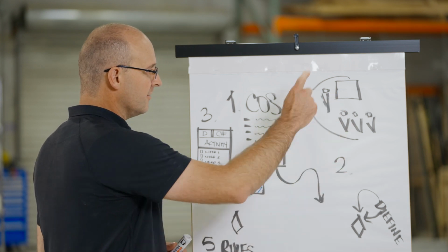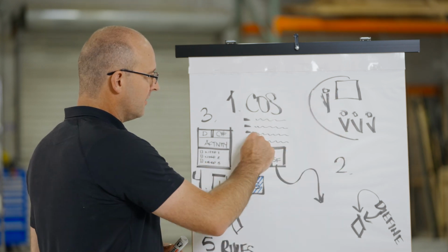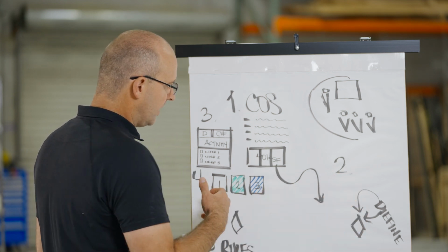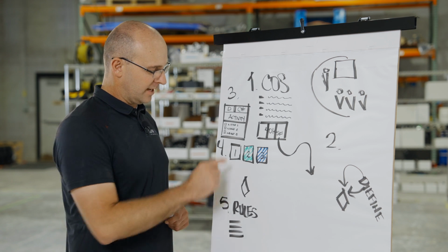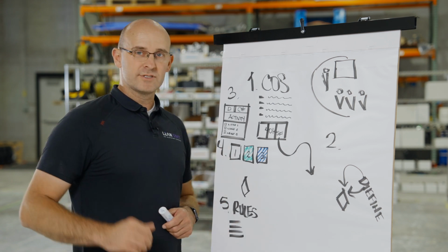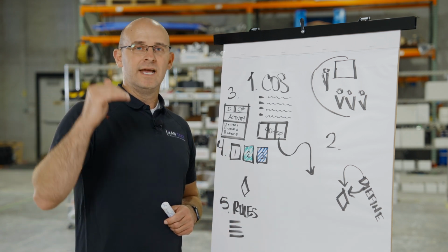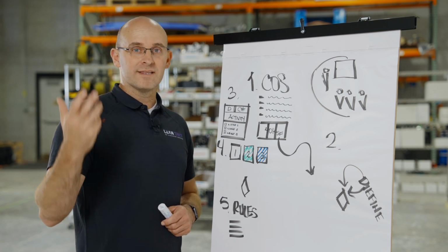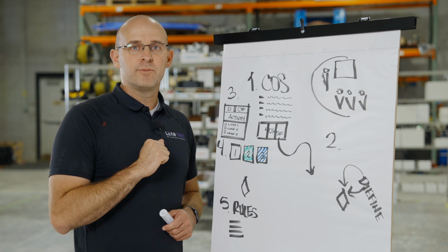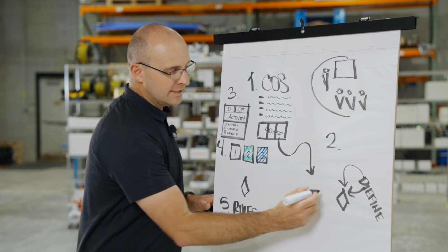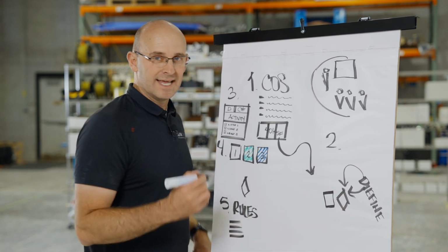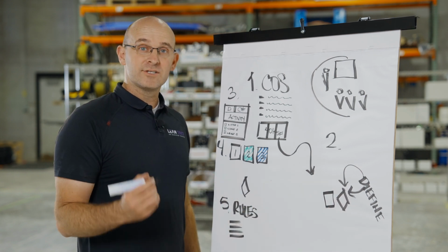Now that you have the people, the conditions of satisfaction, clarity on your milestones, the sticky format, the sticky colors, and the rules of engagement, and everyone is in a psychologically safe environment where we are open, listening, and collaborating, you can begin your pull plan. What you need to do is find the activity which is the last in the cycle.